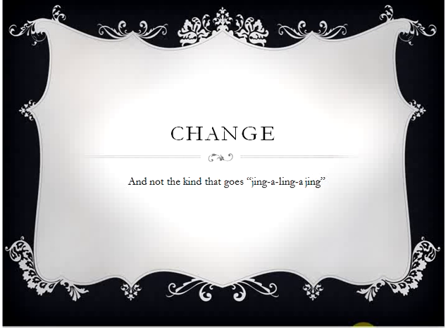Other things to consider are, like I talked about earlier, is there already a change happening that's requiring downtime or a server reboot? Or the change may be best, depending on how extensive it is, to be done during a low census time. Maybe it's best to do the change on night shift. You still shouldn't do it on a Thursday or Friday, so maybe Wednesday night at midnight isn't good. Still keep it on a Tuesday, but you're doing it Wednesday morning at midnight, or Wednesday morning at 3 a.m. when the census is the lowest in that particular department, or the department that's going to be impacted the most.